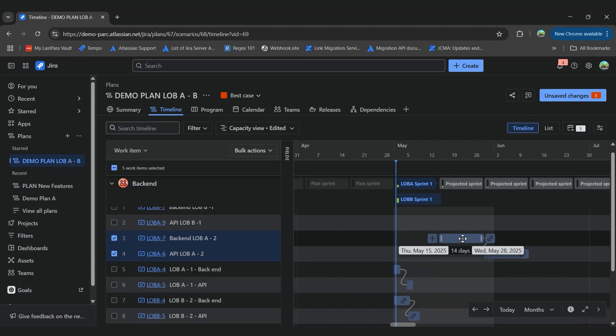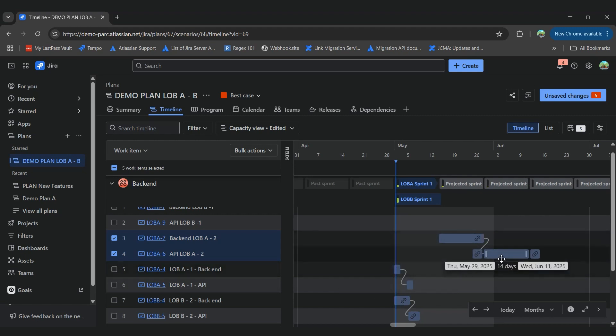And since it has a dependency, the other task was moved also to the right.